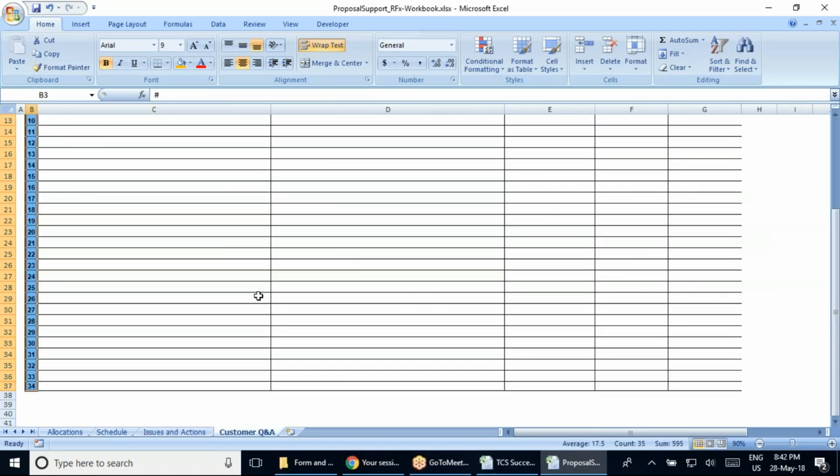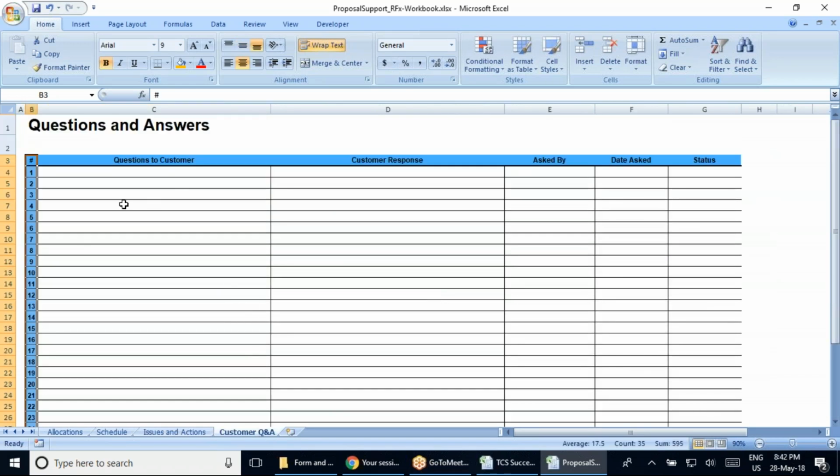Then you also have customer question and answer details. So here it's what is the customer's question, what is the consulting company's response, who has asked this and on what date, and what is the status of this, whether it has been closed or not.